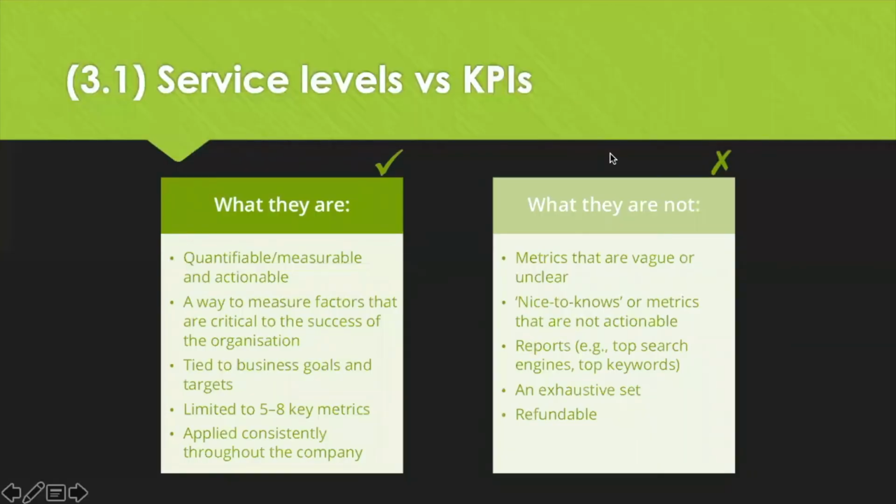And then you've got key performance indicators. They're commonly used in service contracts, but they're not the same as service levels. There is no associated mechanism for service credits to be awarded in the event that performance falls below the expected KPIs. Service levels are not replacements for KPIs, but KPIs should be included as they can indicate bigger problems.